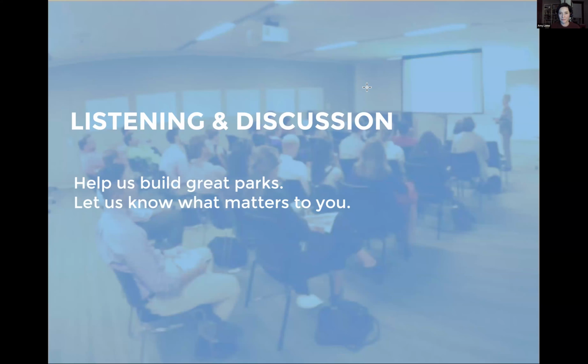Thank you. Go ahead, Amy, sorry. Oh, no, I was just going to say, I think that's the goal, that for any programming and ideas for how the space gets used, that's coming from the community. But Lauren, did you want to say something? Yeah, that's exactly what the plan is for that next phase, to have the community help us program that, which is why we're doing the safety now, because that way we're not trying to do both of those at the same time. We're trying to address the safety so that we can actually start using it as soon as we have that ownership again. And that's exactly what the hope is.